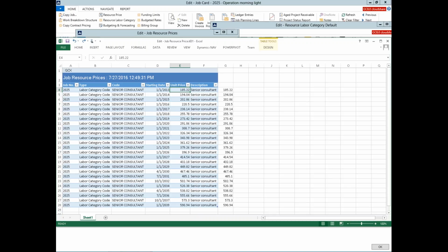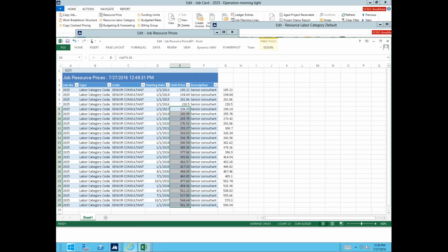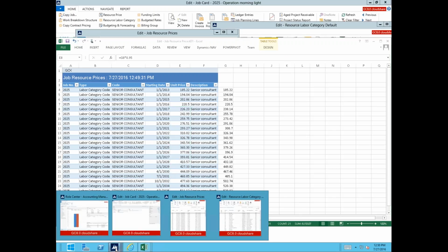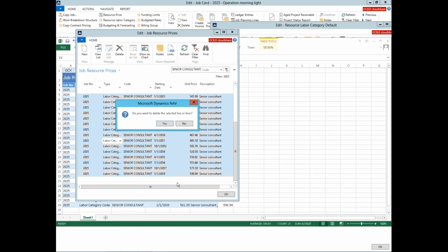And maybe what we're going to say is starting in 2017, we're going to give the client 5% off our standard GSA rates. So I'm going to just say this is times 0.95, and now that's our new bill rate that we're going to offer. And I'm just going to go ahead and format it here. And then what I'm going to do is, from 2017 on, I'm going to take that out of NAV. So we're just going to go in here and we'll remove these future bill rates.